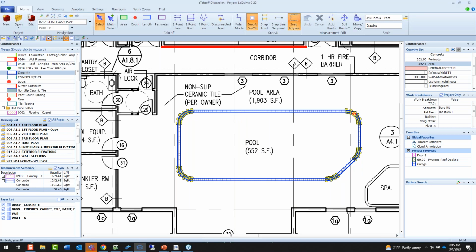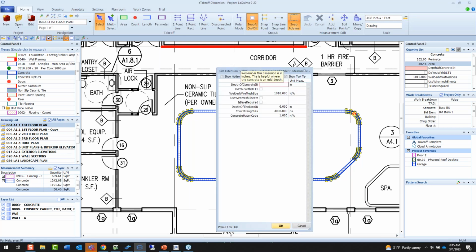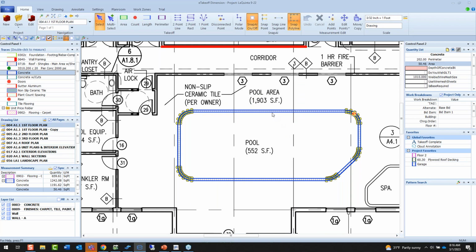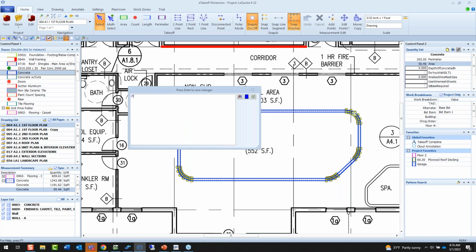It's concrete in this case, but we'll go ahead and enter this in, and I'll say it's 4 inches. We're not going to have any reinforcement. By the way, for those of you doing concrete, when you do your takeoff, you probably have those variable lists where you say, I want to name the size of the bars. We can do that, of course. If you're doing it at tonnage, taking off rebar in tonnage and outsourcing the detail to a downstream partner, we'd do that as well. But in this case, we're going to put in 3,000 PSI and move forward. I'll do one other naming convention just so you get the sense of it when we go downstream with this, and I'll call it pool.